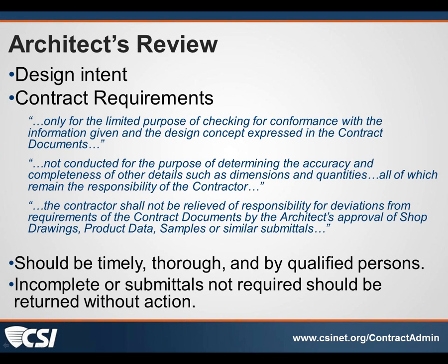If it's good to return a submittal that's incomplete, it's good for all the design team. And what we're talking about is getting that submittal back as quickly as possible so that it can be resubmitted. Particularly with MEP, I see that it comes in as a very large package, and there are pieces and parts that may have been missed in the process because of the voluminous information. I find that there may be small things here and there that could be submitted without returning the whole thing, but that's not following the process we're talking about.